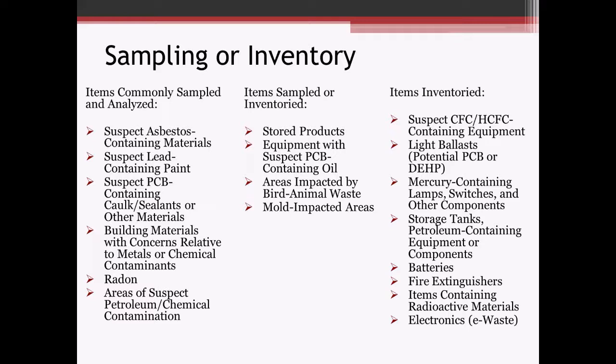Similar with mold-impacted areas. If you're doing a renovation or demolition project and you see it, you know you've got it, and you know you've got to get rid of it. It doesn't make a lot of sense to sample it, but again, if you're going to occupy those areas after the renovation, you might want to consider some sampling afterwards.